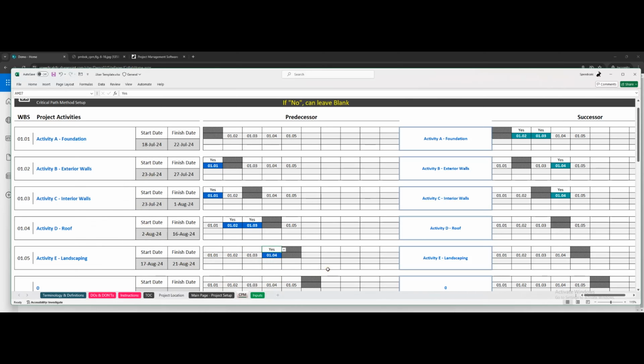And so a good way to do a check on your critical path, and it is important, because when you start getting a ton of these activities, you can go cross-eyed sometimes with all the activities that you're following on a project. To make sure that everything's connected properly, just look at what you have here on your predecessor side. Of course, we know there's nothing before the very first activity. So we look at B, and 1 is here. So the 2 here means that 2 needs to be connected to this 1. So we go over to 1, and there's the 2. Same situation: here's a 1 under our 3, so for 1 we need to have a 3. And there it is. Go down to D, and we have a 2, 3.